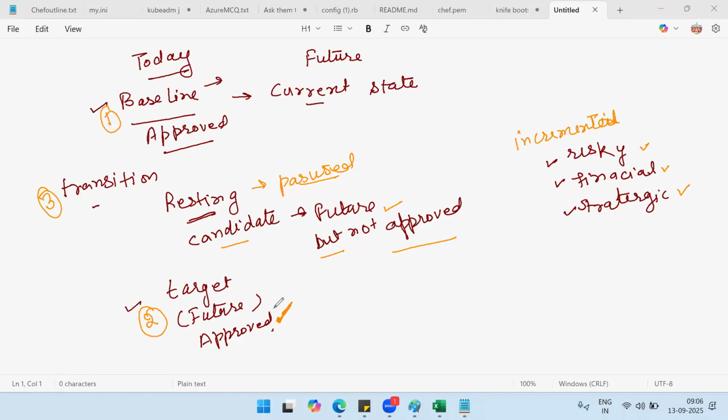So we will apply one policy at a time, and we will give some time to the customer also, so that he or she will become familiar that there is this change. Once he is comfortable with that change, then policy number two, then policy number three, like that. And after a given time duration, you will apply all these policies.